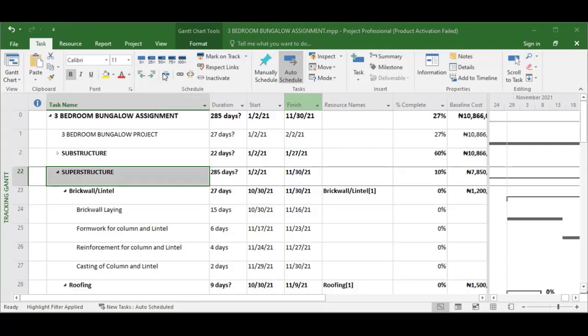In the process of doing that, maybe you are spending 5 days for painting. You want to spend 3 days for first coat and primer, then you want to spend 2 days. It's only 5 days that you are spending, but the 5 days will be split. There will be some days in between.